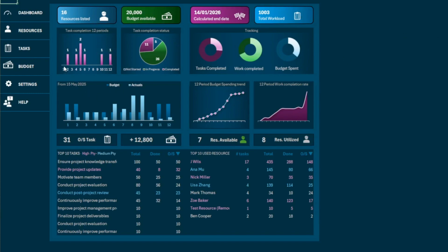This is the burn rate, if you like, of the tasks, how many tasks you've completed on a 12 months basis or on 12 weeks or days. Once again, the periods are like the workload. You can put any units that you like. Here I've terminated one task, two tasks, one task. When we complete a task, we need to put an end date, and this is how I am able to calculate this task completion here.